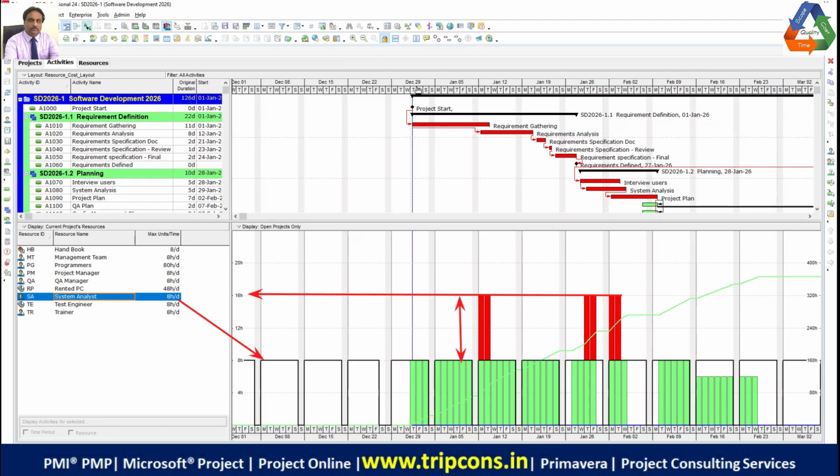So he says, look, the system analyst is a constrained resource because it is very costly. So what he says is that you reduce the work. Please reduce the work to the level of one. We cannot provide more than one to any of the project teams. Right? So what you need to do, guys, is reduce the work on the 6 days.